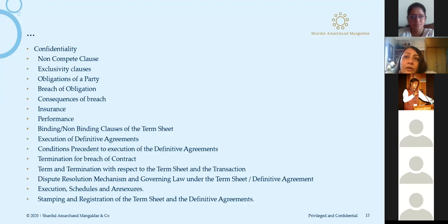Certain contracts happen on the high seas, where the title of the goods is actually being transferred. All of these nuances we need to understand, because until the time it is in whose custody and title it is, that is the person responsible for that particular good, and any loss at that time will be to that person's account.